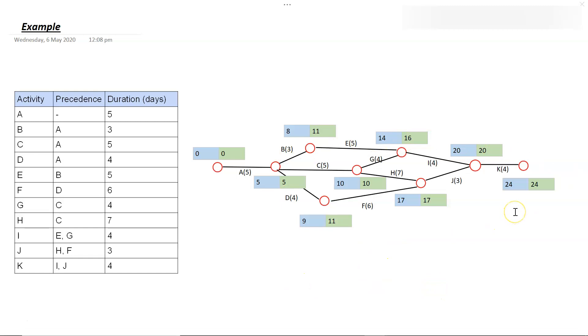We have the way to find the critical path. Now we can follow the one that has equal duration for the backwards path. And we know that that's going to be the critical path. So if we follow this one, it'd be K down to J, because this gives us the equal forward and backwards path duration, and then up to H and then C and A.